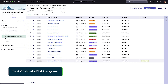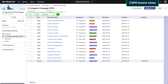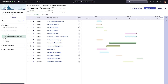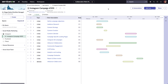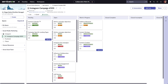CWM boards have three default views you can switch between: list, Gantt, and Kanban. The list view displays all tasks added to the board in a grid format. The Gantt view displays a grid and calendar view to help you visualize the progression of tasks. You can adjust dates for tasks based on changing priorities by resizing or moving the corresponding bars in the calendar section. The Kanban view displays task cards in vertical lanes of state so that collaborators can update the status of their work as they progress with it.